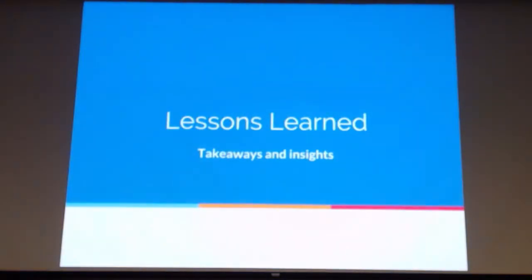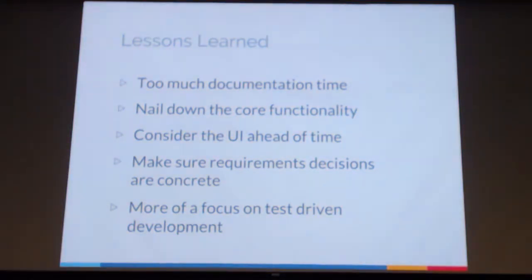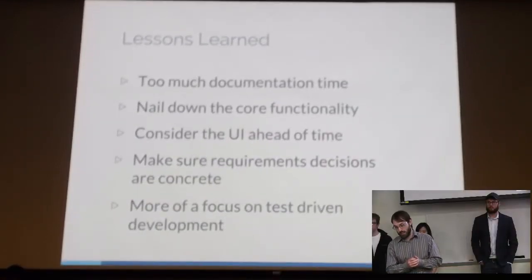And lastly, some big takeaways that we had just while we were working on this. We definitely spent too much time on documentation at the beginning. This was a web app and we needed to be a little more agile with our process, so we're trying to move towards that as we go forward. We needed to nail down the core functionality. We did that. We put it in our project plan, but it wasn't something we had within the first few weeks because this was a brand new project.